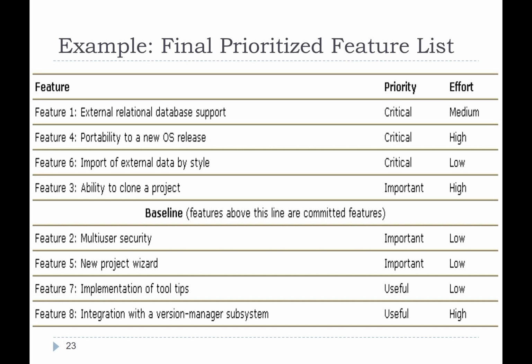So if I don't have that feature, then that second feature is completely useless. See what I mean? That's a very good example of somebody who invested time on creating the schedule and didn't plan on creating the features of adding and dropping courses. Then they realize they have the schedule maker, but not the course adder, and the product doesn't make the minimum. Remember the word I was saying, making the minimum? If you give me a product where I can add and drop courses without the schedule, I can use it. But one that gives me the schedule without being able to add and drop courses is completely useless to me.